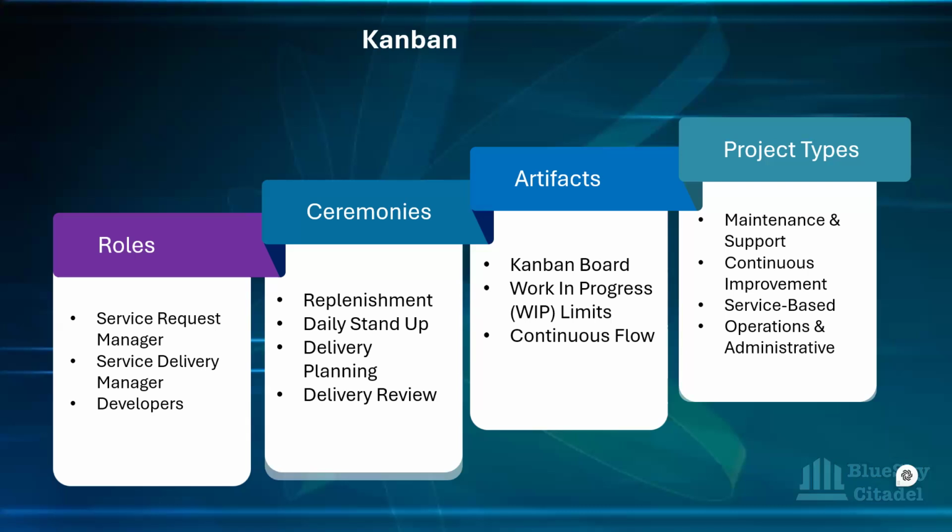And then you have the work in progress limits. We call it WIP limit, but the WIP is work in progress. And this ensures that the teams don't take on too many tasks at once. So, for example, you can have a team of 7 members, and they've put their work in progress limit for maybe their in progress column to say it shouldn't be more than 7.